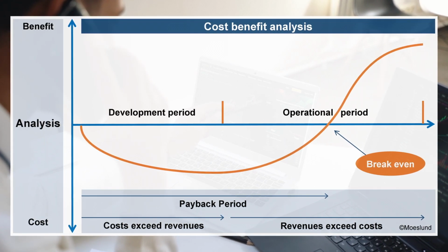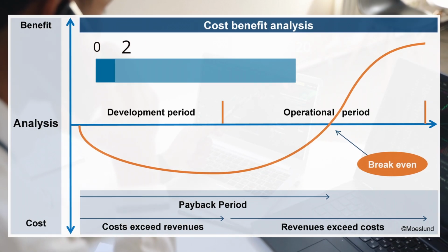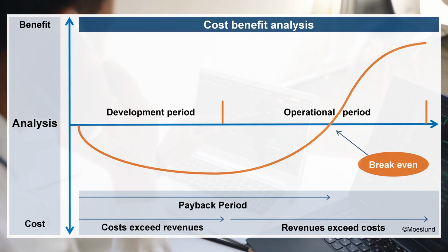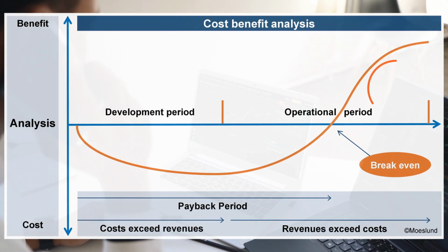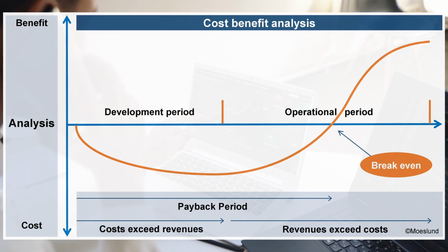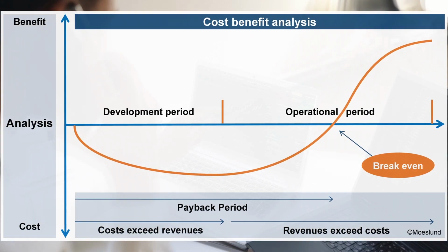Therefore, cost-benefit analyses are almost always measured in a monetary sense in private sector businesses. There's a world of difference in whether the project shows a break-even profit after 3 years or after 15 years, and whether profit barely covers the cost of the project or the overhead is acceptable. With 15 years and a small margin of profit, project approval does not stand a chance.